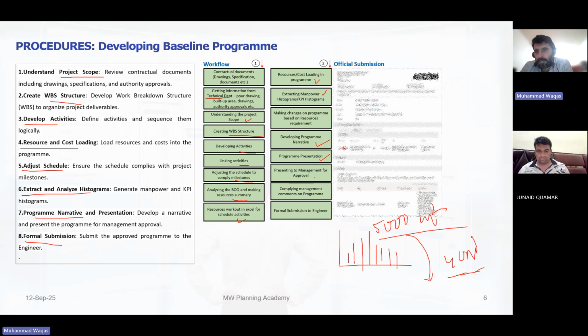Because I think I will not get that many resources. Okay, it's not your headache whether you get resources or not. Just assume you have resources. Then 5 is enough. No, then it should be 7. Okay, why 7? Because the site is difficult, and WIRs and procedure and this and that. He should give some explanation why he wants to increase or decrease the duration.